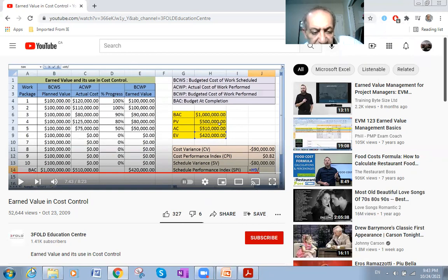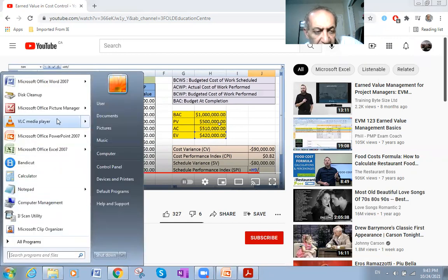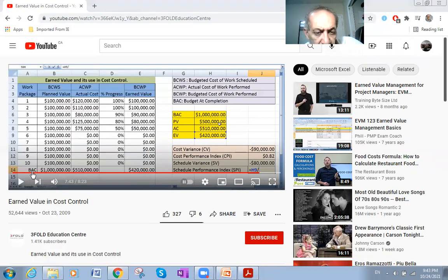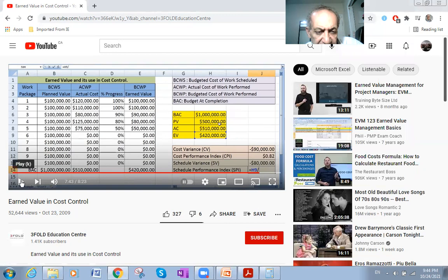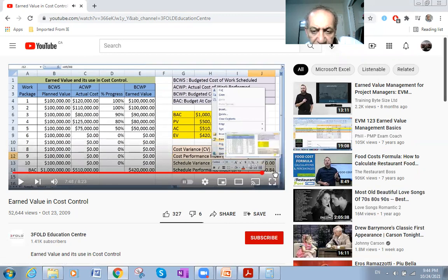Let me show you on the calculator again. 420,000 divided by 500,000 is 0.84. Like you see here, 0.84.